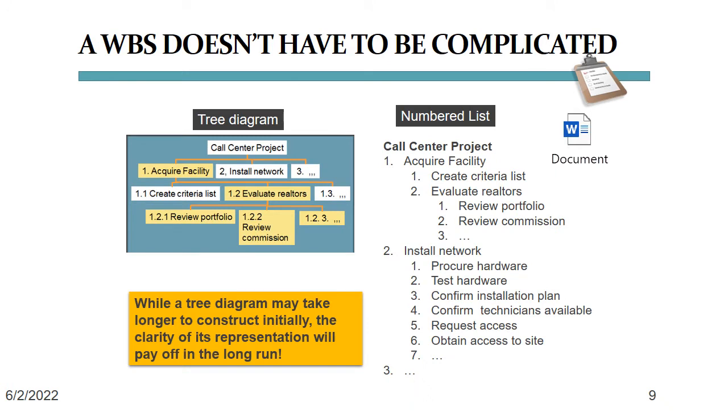Most often, the work breakdown structure comes in a tree diagram. Tree diagrams are a great visual aid and can help retrace the logic you had in mind when breaking down the work. The tree diagrams can also show up as a numbered list, especially if you use tools like Microsoft Project, in which each task carries a WBS number. This is basically like a sideways tree.